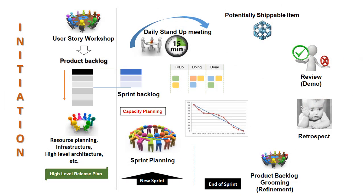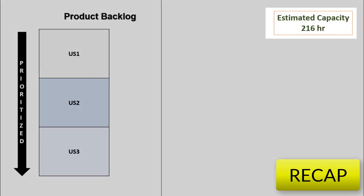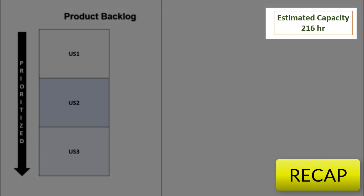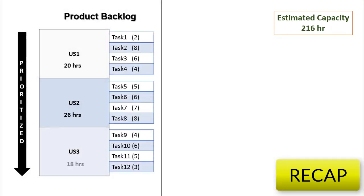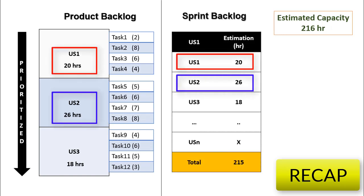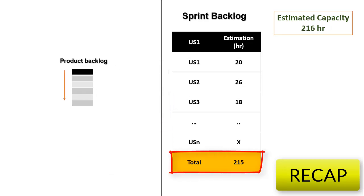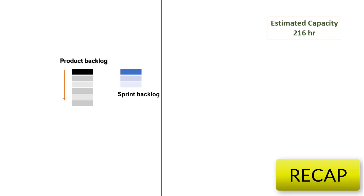In the last video we discussed about the scrum process overview and then about the sprint planning ceremony in detail. We learned about how sprint capacity is estimated. In a sample calculation we estimated 216 hours as sprint capacity, and we will be using the same for the discussion in this video. We discuss about the sprint backlog formation based on the available capacity, adding stories that would make the sprint backlog items less than or equal to the capacity hours. Let us assume that the sprint backlog thus created is of 215 hours.